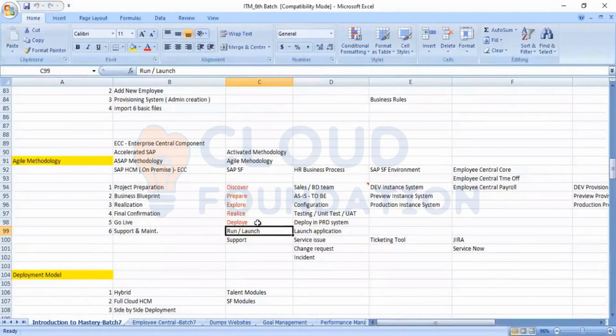When the partner company has completed the implementation and the application is go live, there is a concept called the hypercare period, where 30 to 45 days come under hypercare. In that period, after the post implementation, if any errors, bugs or issues come up, the partner company who implemented that particular application for the go live will take care of any issues or bugs.